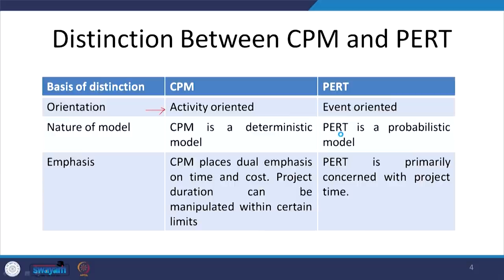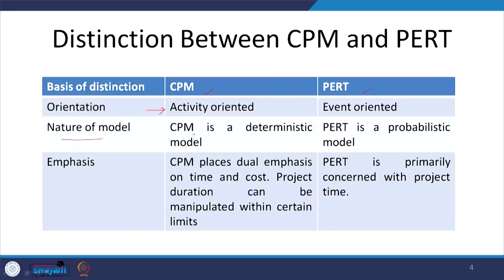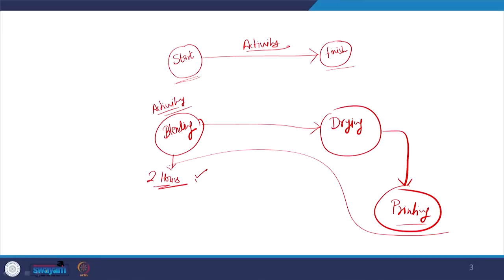When we are focusing on activities — like blending, then drawing, then printing — that is a CPM case. CPM is a deterministic model, meaning when I talk about any activity such as blending, I give you one specific time: blending will be completed in 2 hours. I am giving you one time estimate — this is deterministic.